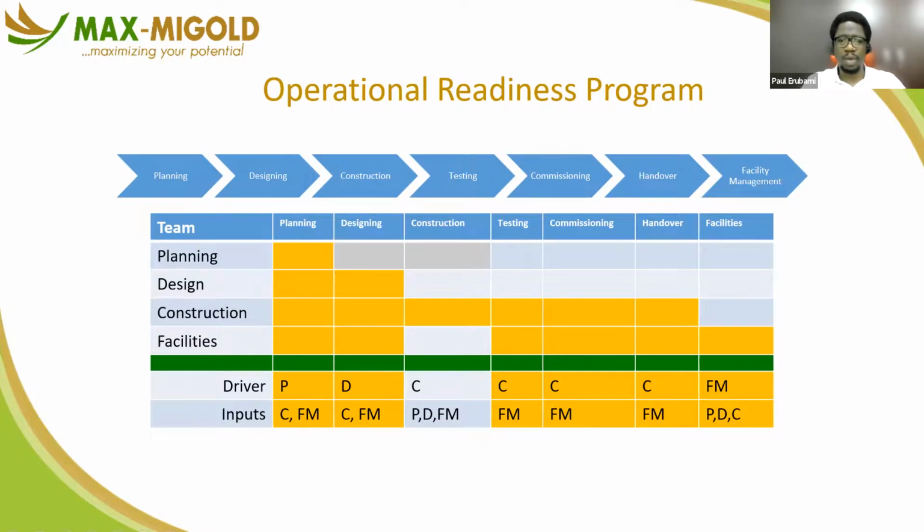Now, in the construction phase, you want to be sure that change management is in place. You want to be sure that quality control and quality assurance processes are in place. You want to be sure that documentation of variations and changes and exactly what is being built is being done, and ensure that all the right licenses and permits are being obtained as the work goes on. Those are things you are just paying attention to, because those are things that are going to haunt you for the rest of the useful life of that property if they are not done right.